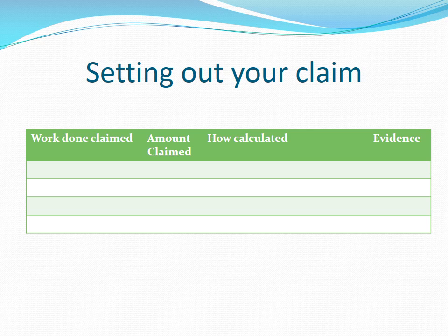You can define the work by reference to a plan, a quote, a contract, or a description of the work, such as a 2-metre high wooden paling fence of 30 metres length. If a contract allows for progress payments, then you would refer to the description given in the contract, such as framing stage. The description needs to be clear enough for the person receiving the claim to understand what they are being asked to pay for.